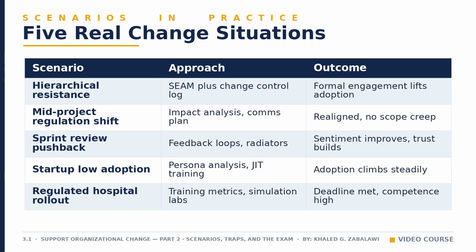A hospital must digitize records by a legal deadline, while nurses vary widely in digital comfort. Training completion is tracked formally to guarantee compliance, while weekly simulation labs gather real usability feedback that reshapes the content each week. The deadline is met alongside genuine competence.